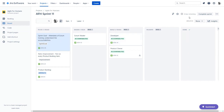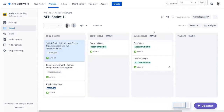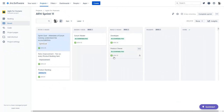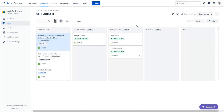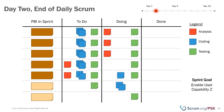Another really useful thing we find here is days remaining in the sprint. This gives us the opportunity to know how many days are remaining so we can question whether we really are going to be able to meet the expectations of completing the sprint goal by the end of the sprint. You can view the board collectively as a group of developers, configure the workflow in a way that makes sense, add work-in-progress limits if you're trying to optimize flow, and it really gives you the opportunity to create transparency around progress towards the sprint goal.